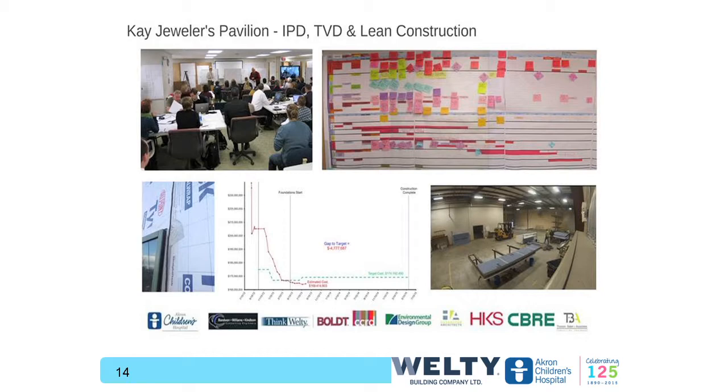We use the same lean principles when we use a pull plan. I don't know if you're familiar with a pull plan, but it's the most responsible moment to do something. And you get to the goal, and you pull the work toward that goal. We did it all with sticky notes, and I think Don will talk a little bit more about that. So we had surgeons, anesthesiologists, nurses, clerical people on these teams. What do you think that they thought about this process? They were out in a warehouse, a very unfamiliar environment for them.